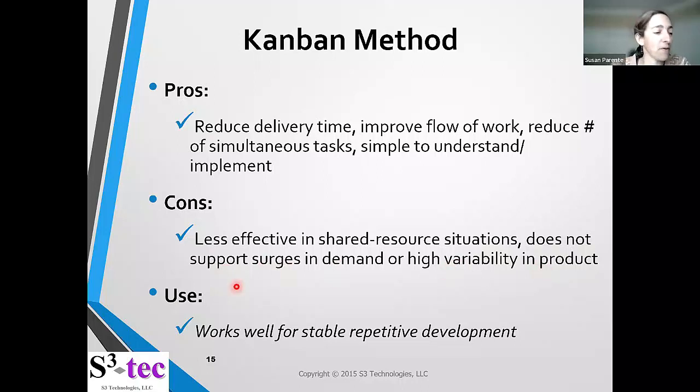So for example, let's say you have 3 people working and you're using Kanban, and now you have a bunch more requests, a bunch more tasks that are needed. If you only have 3 people, you can't easily support adding more people. Basically things just get queued up and prioritized. And so if there's a high demand, people end up just having to wait.